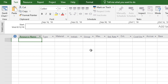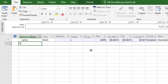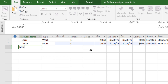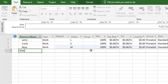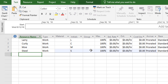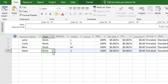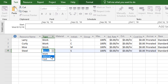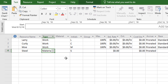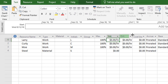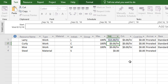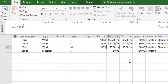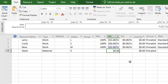Let's say we have three team members: Larry, Curly, and Moe. I'll type their names in the first three rows of the sheet, then add steel at the bottom as the material I want to track. I need to change the type for steel from Work to Material. Then I'll assign hourly rates: Larry is $15, Curly is $20, and Moe is $25. For steel, we're pricing it by unit — $600 per ton.